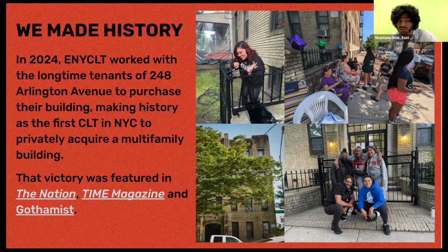I think one thing Sam mentioned earlier was thinking about the potential environmental hazards here, not just what we know to be there. And we know the area that 248 Arlington Avenue sits within, and all the potential environmental risks associated with that, along with there's been a series of slumlords. So we conducted a phase 1 study on the building, where we conducted soil testing, looked at the historical uses of the building and around the building, conducted indoor air sampling to get an understanding if there are potential health hazards, and to make sure if there are, that we're actually addressing those. Inserting something like a vapor barrier or whatever is needed.